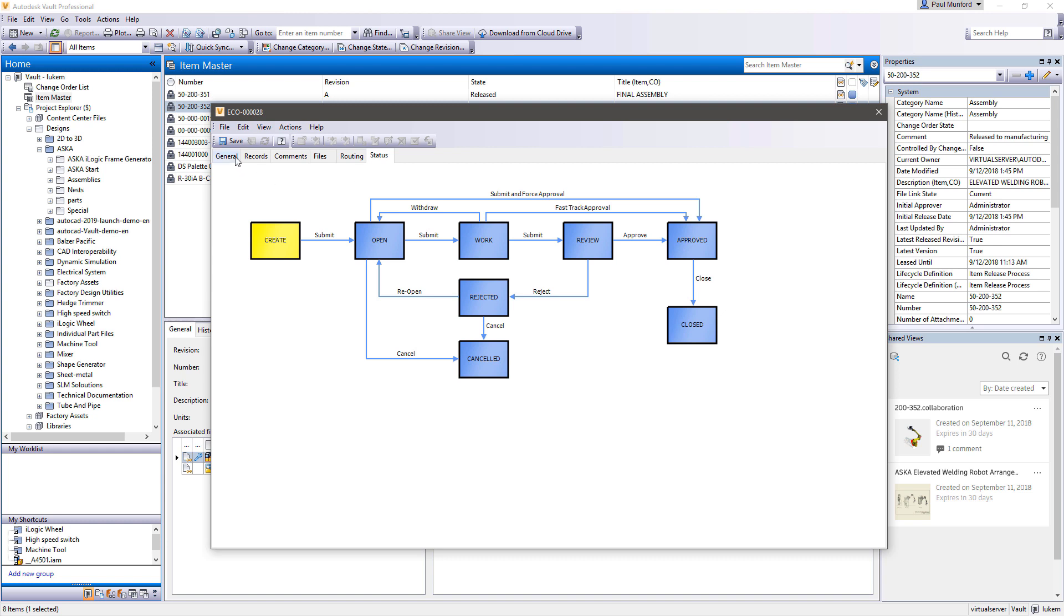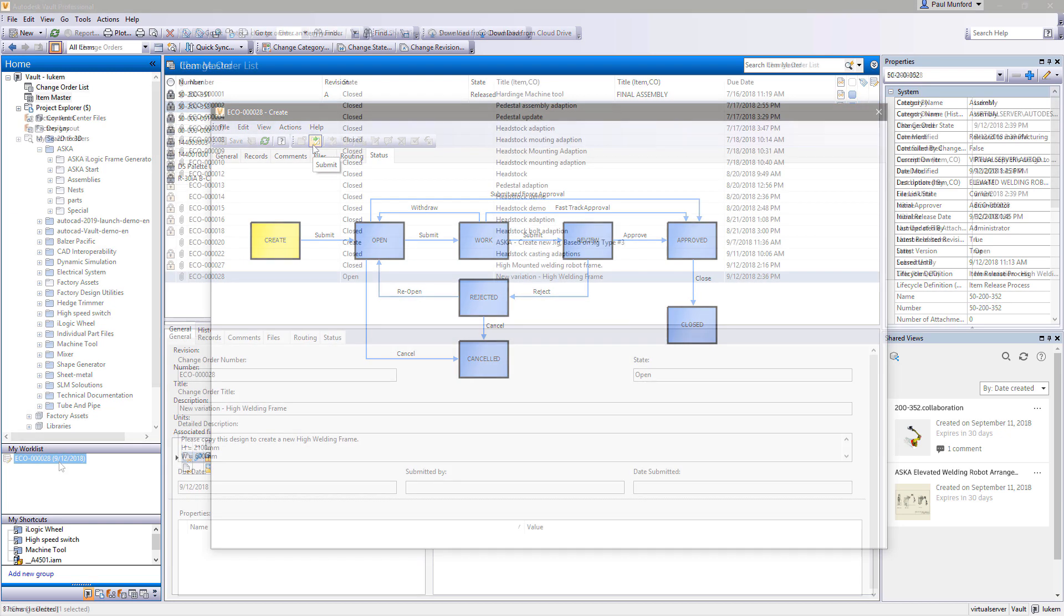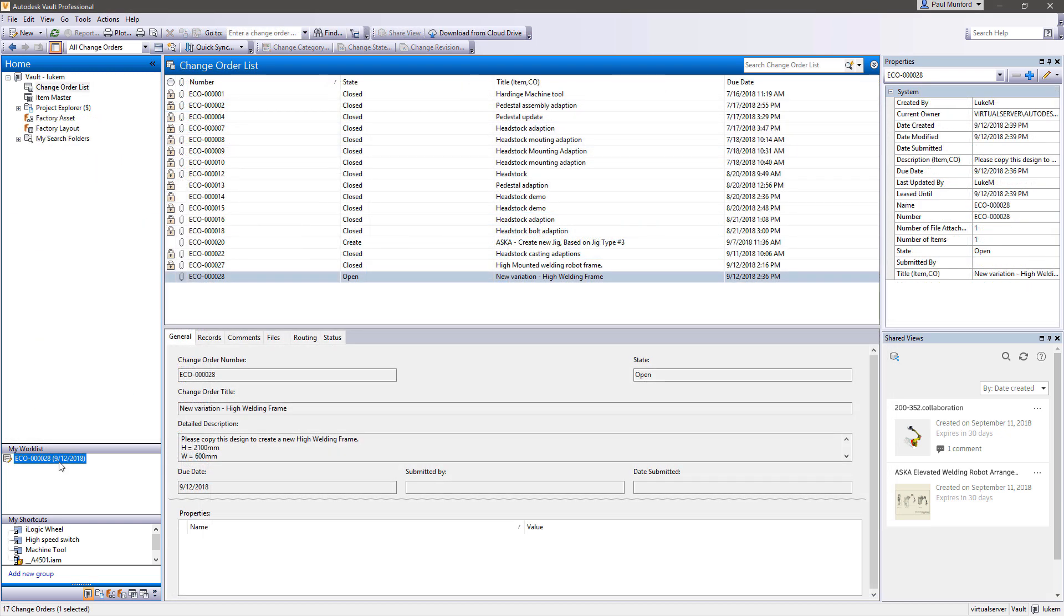Once saved, the change order process is initiated and progress is tracked and reported. Notifications are provided to responsible participants via email and open change orders can be seen in your Vault worklist.